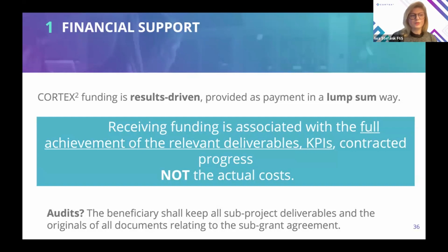Though some of you, if you had participated already in the other open calls run by the European Commission, this is probably a very well-known system. But if it is a new system for you, it means basically that receiving funding is associated with the full achievement of the relevant deliverables, KPIs, and contracted progress that we are checking through all those review processes that we have demonstrated, not the actual cost. So you will not be paid against your actual cost.